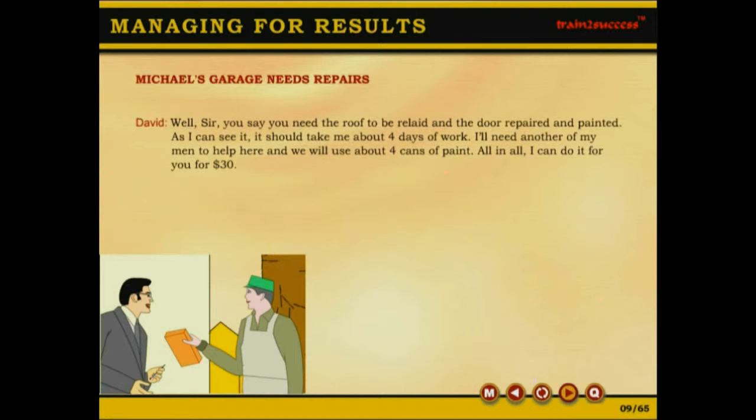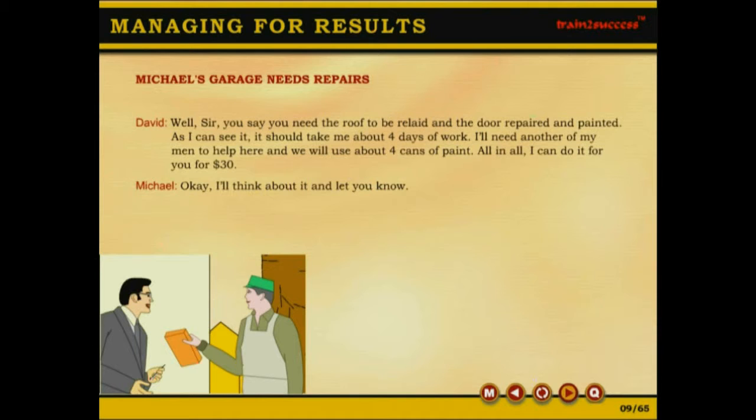David responds: Well, sir, you say you need the roof to be relayed and the door repaired and painted. As I can see it, it should take me about four days of work. I will need another of my men to help here and we will use about four cans of paint. All in all, I can do it for you for thirty dollars.